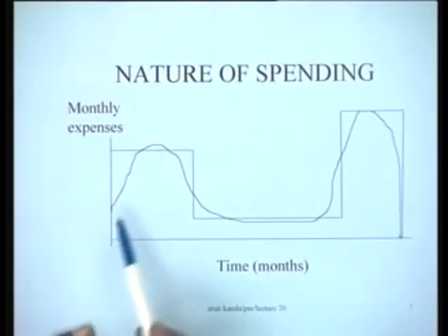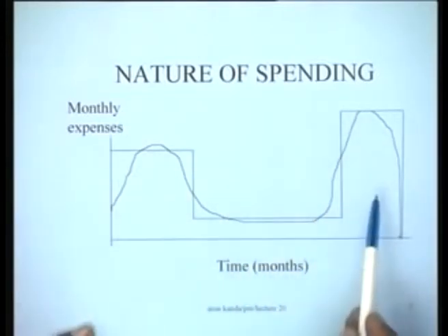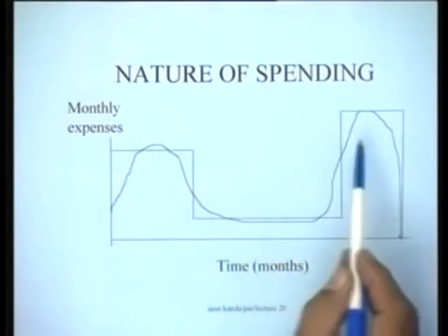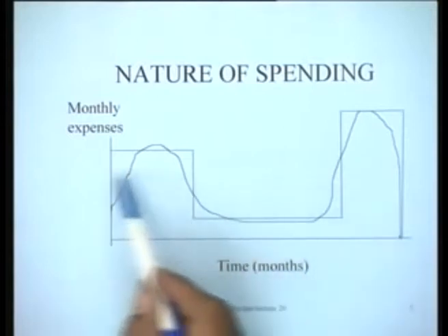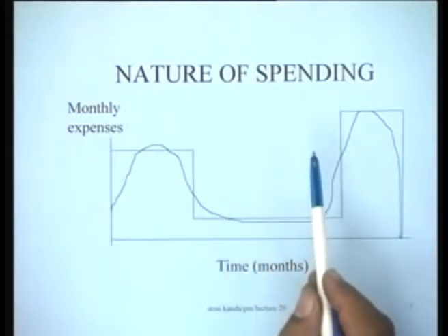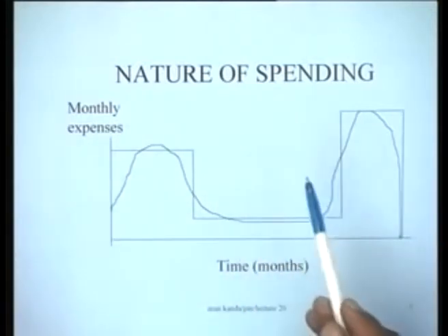Now one thing is, if there are a number of activities of this kind, each with its own peak, quite likely that all of them added together will give you a uniform peak, and therefore the assumption that you have made in the PERT cost about a uniform pattern of expenditure would remain valid.